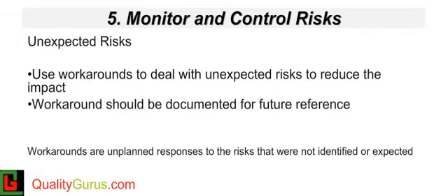While monitoring and controlling risks, unexpected risks occur. These unexpected risks are the risks which you did not identify in your risk identification process. A workaround is created to deal with such risks.